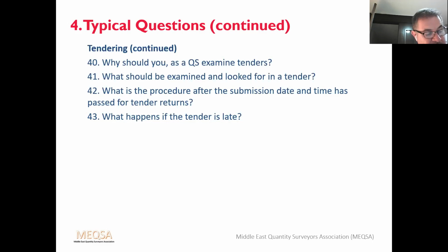If it's a public client, a late tender just cannot be accepted. Even if it's a few minutes late, a judgment call is needed, but I would always say don't open it. If it's late, you just don't open it. Simple as that. If you do start accepting late tenders, it sets a standard that you don't want. It means that contractors in future may also not keep the deadlines. You've got to stick to it.